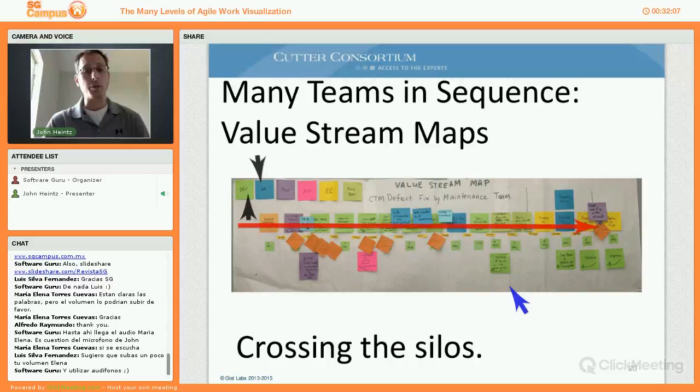And so what we were able to do, understanding this big picture, is to say that if we all put more effort into making that integration deployment faster, we can save the whole process a significant amount of time, making fixing and delivering bug fixes much faster. Instead of trying to optimize for the development, finding the bugs, or the quality function to test the bug fix, actually putting effort into the integration environment was the biggest effect on improving this system. Being able to see this across all of the organization, across all of the silos, gave us that ability to make that decision as a whole across the different silos.